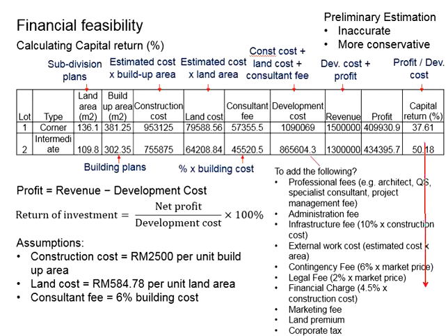Let's say the average capital return is about 40%. You will need to consider the duration of the project. How long will the project be? Let's say the duration of the project is 2 years. That means your 40% capital return should be divided by 2 years, as you are quantifying the annual capital return. With that, your annual capital return will be 20% per year. Now you might want to look into whether this 20% capital return is attractive to you or not, whether you should go for the investment.